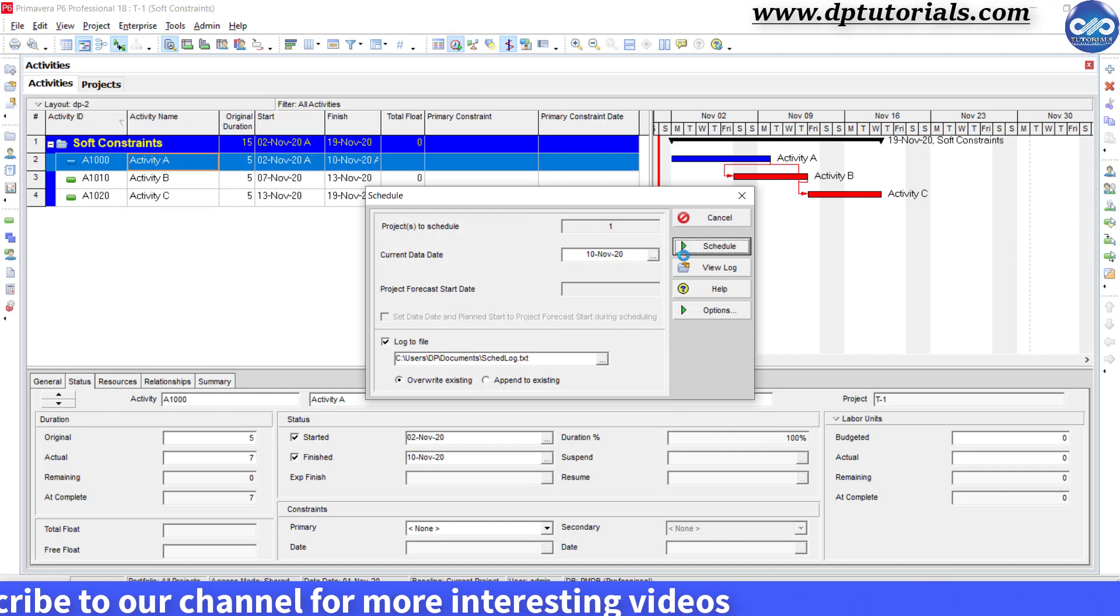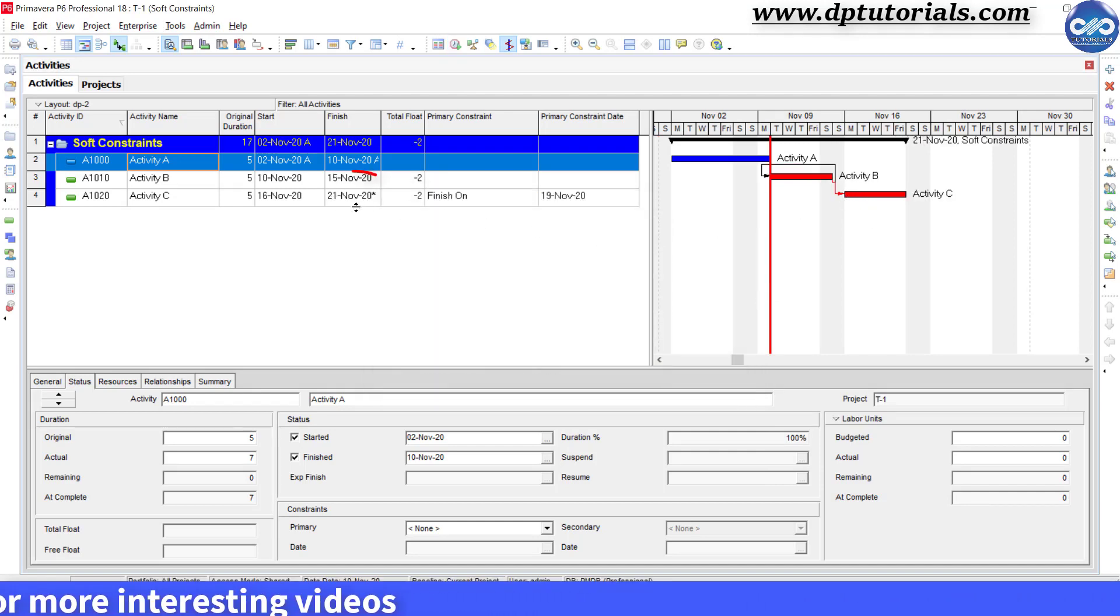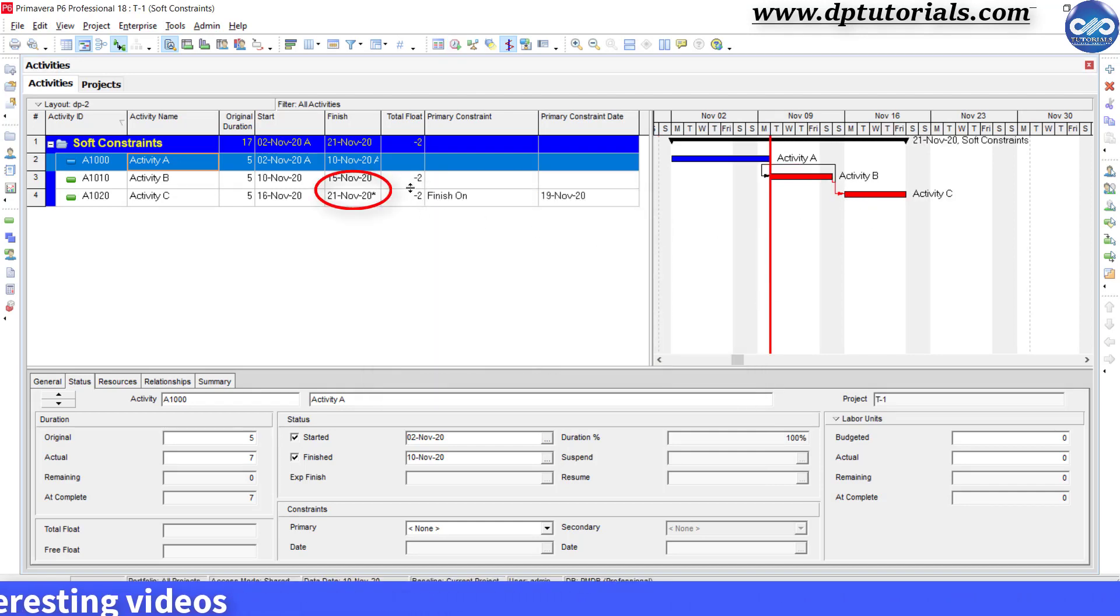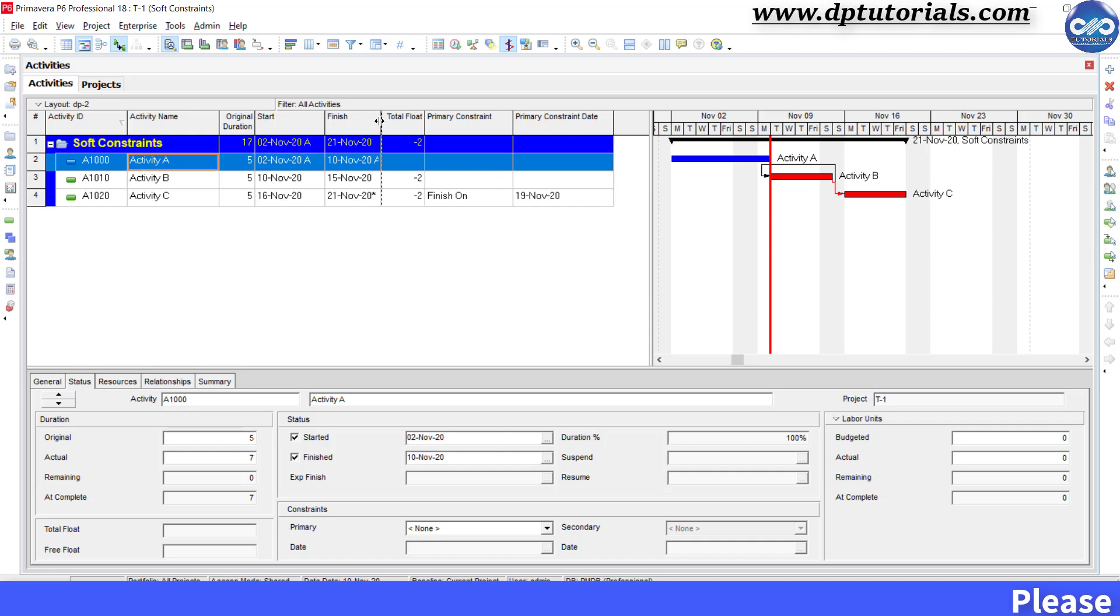You will observe that the activity C's finished date has been moved to 21st November and the total float has become negative that is minus 2. This negative float indicates that we cannot meet the project finish date with this schedule.